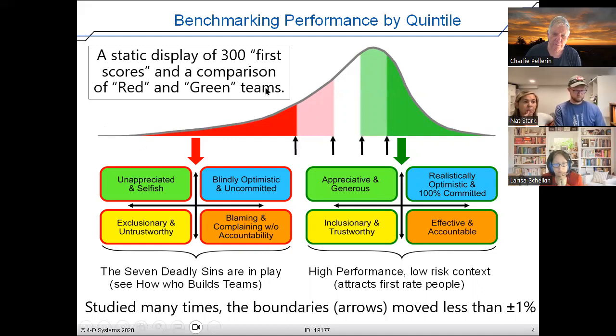And we found common things, like the money's grossly inadequate. In a case like this, somebody made a bid for N dollars because the vice president made them, when they know it's going to take 3N or 4N dollars to do the job. So they're constantly getting beat up by the customer. They're constantly overrunning, and it can't be done. As long as that, metaphorically, is a thorn in your foot, you can't run. You've got to pull the thorn out.